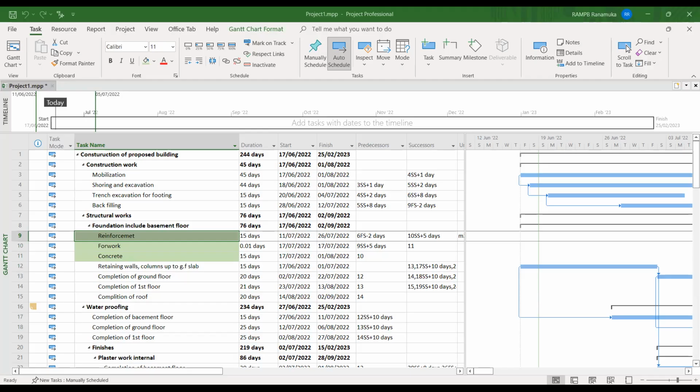So in here, first 154 meter cube. For that 154 meter cube, cement bags are 1,664, and sand 77, and metal 154. This is in meter cube. And also in here, I have allocated labors 5, 4, and up to 7. So likewise, we have to complete this chart for our program.